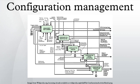More recently, configuration management has been applied to large construction projects which can often be very complex and have a huge amount of details and changes that need to be documented. Construction agencies such as the Federal Highway Administration have used configuration management for their infrastructure projects. There are construction-based configuration management tools that aim to document change orders and RFIs in order to ensure a project stays on schedule and on budget. These programs can also store information to aid in the maintenance and modification of the infrastructure when it is completed.